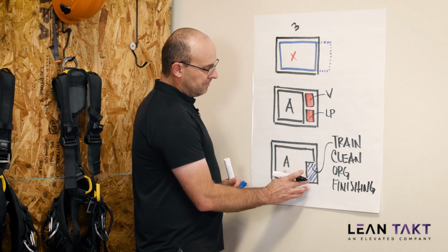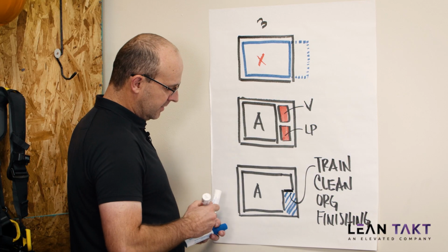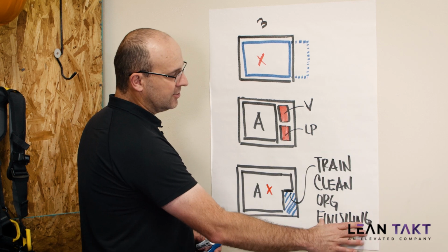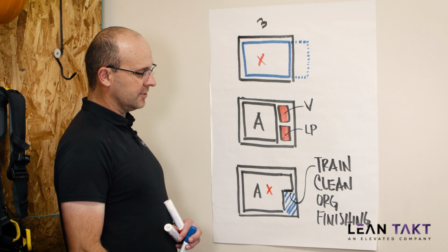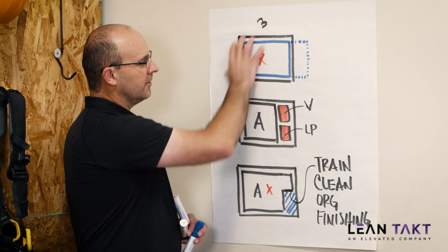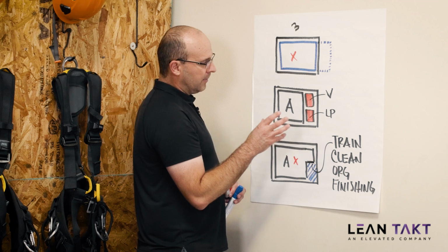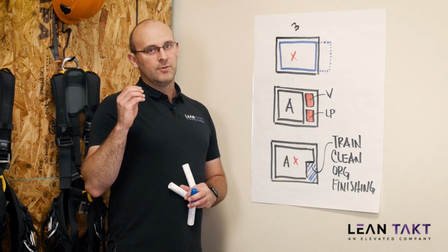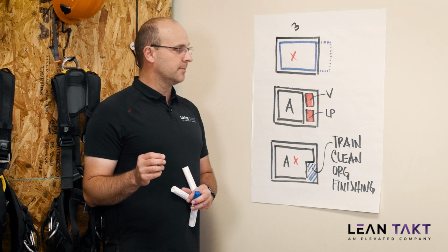This buffer, if we do actually finish here and we don't experience a delay in between, is going to be used for these useful things that will be needed in the future. And if we do experience a problem, you'll need that time anyway. So remember that when you are packaging and leveling, always enable your crew a bit of a buffer. We do not want to rush and push and panic people.